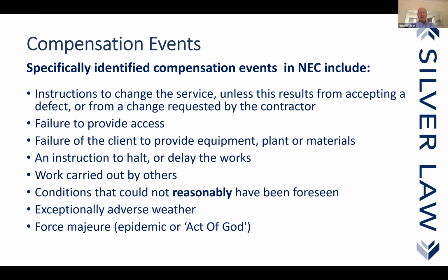In the NEC, we have a whole lot of compensation event items. They're not always as easy as one would like to understand. You know, there is no clause that says variations. We have changes to the works information. The works information is what the contractor has to complete. And if there are changes to that works information, then that is a compensation event. Now, the works information where there is a design obligation upon the contractor will be separated into two parts. And it will depend, therefore, where the change is.